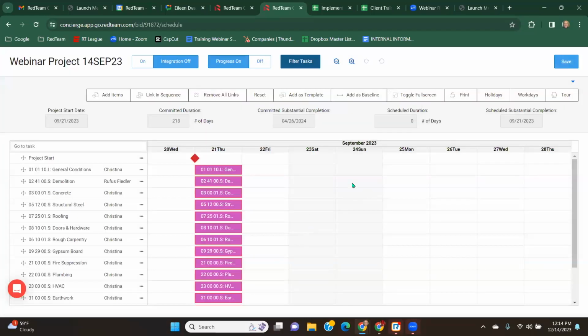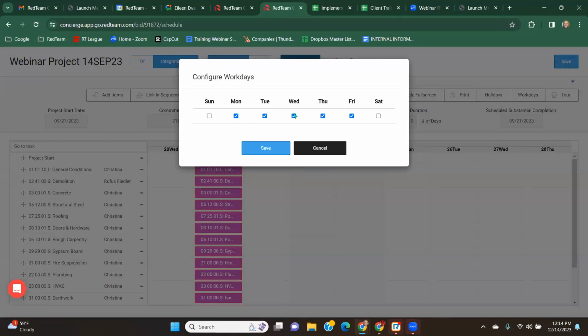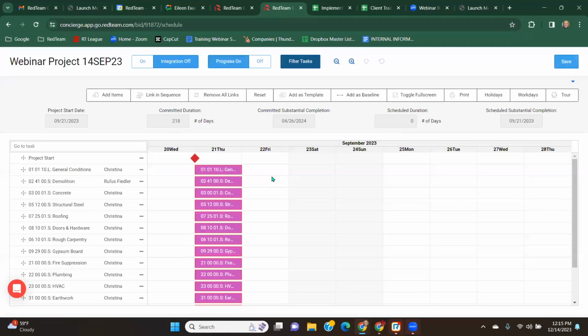All right. So the reason I took a detour to show you all of that is now when we go back up to working days, we can make those changes across all Fridays or all Saturdays or all Mondays, whatever the case may be. If your normal operating procedure is that you're closed on Fridays, you can unselect the Friday, click save, and now as we go across, you'll be able to see that all Fridays are grayed out.